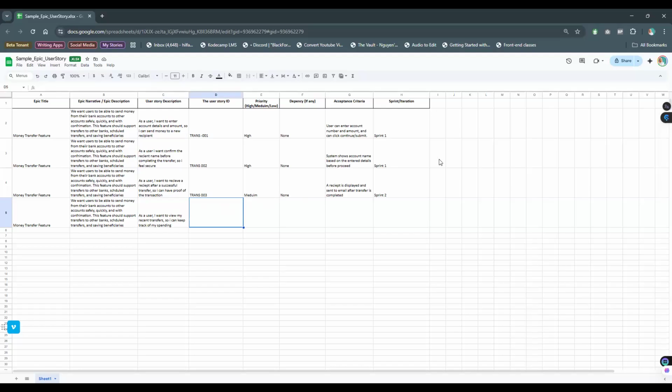So if this 003 is part of the first 10, let's say you're using a count of 1 to 10, if it's part of the first 10 of the complaints you're getting from users, then you can put it as a high priority. But if it is not, you can always push it down. So it varies. I hope that answers you.